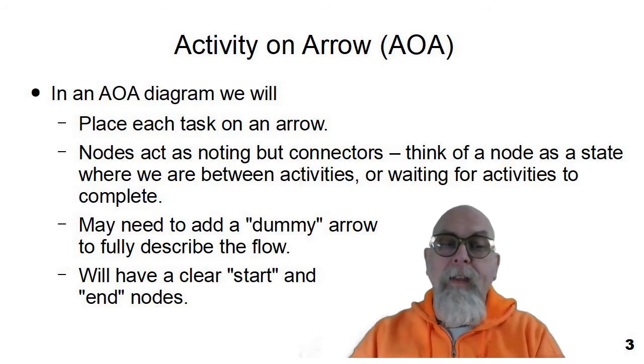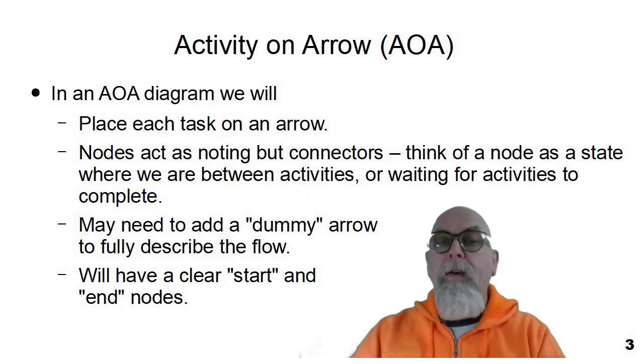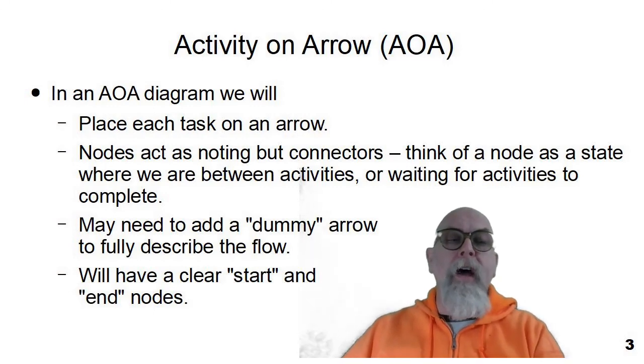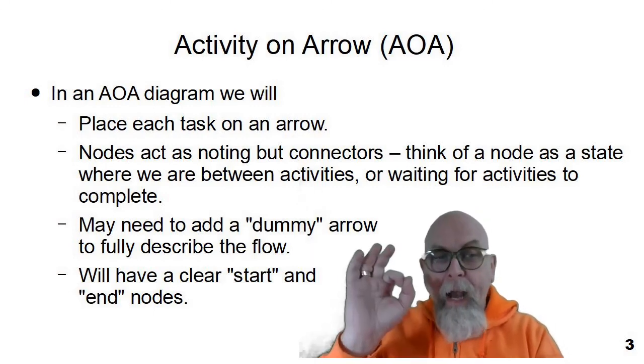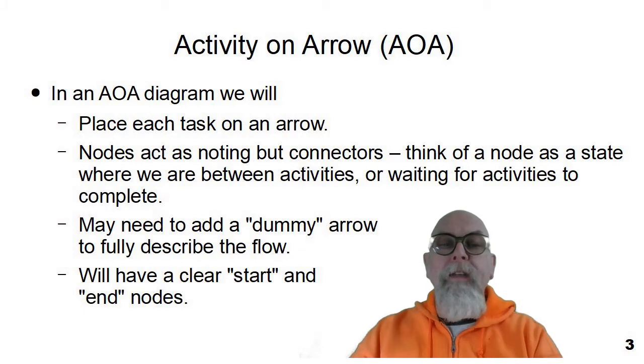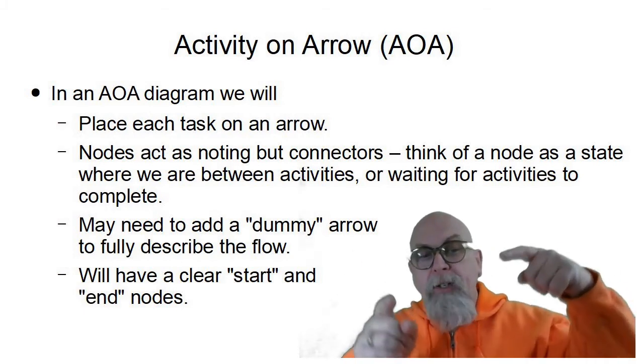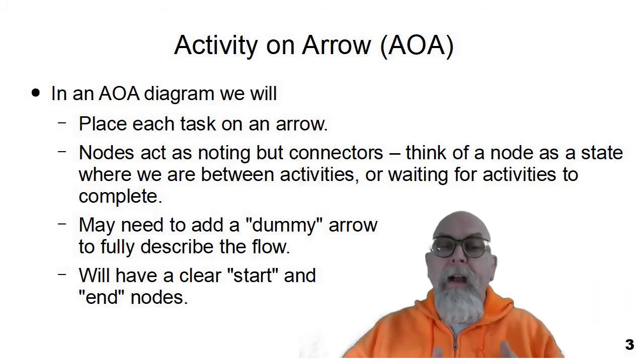You can take off on the arrows going on the next activity arrows. So each task is on an arrow. The nodes are nothing but connectors. You can think of a node or a connector as a state where all of the activities have finished and are waiting, and you're waiting for activities to complete before you go on to the next activity or group of activities.